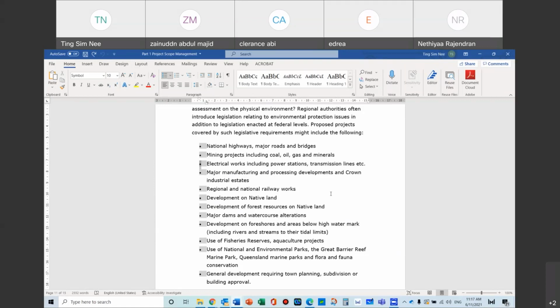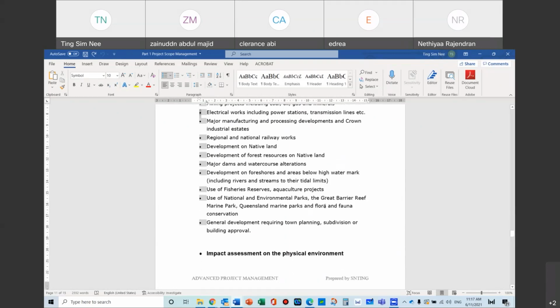I would say like traffic surveys, you'll probably be getting people to sit down and record the traffic over 1 week or 1 month on the flow of cars and all that. That is one type of study. And surveys on demographics will probably involve going to different houses to do some surveying work, or you can go to the statistical department to check the existing statistics and all that.